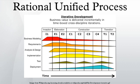The key domain analysis for the elaboration phase is the system architecture. Construction Phase: The primary objective is to build the software system. The main focus is on the development of components and other features of the system. This is the phase when the bulk of the coding takes place. In larger projects, several construction iterations may be developed to divide use cases into manageable segments producing demonstrable prototypes. This phase produces the first external release of the software, concluded by the initial operational capability milestone.